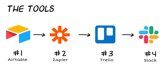We also used Slack, which is a collaboration and communication tool. We set up a Trello channel in Slack, which shows any activity from the project's Trello board via a Slack-Trello integration. We also set up other channels in Slack to support project communication and collaboration.